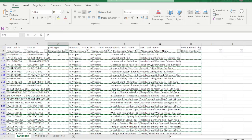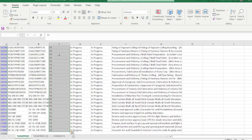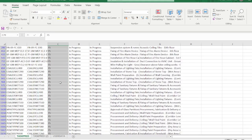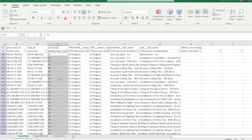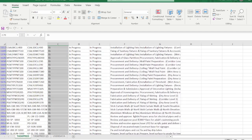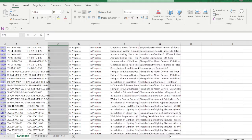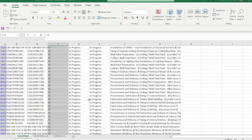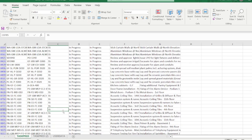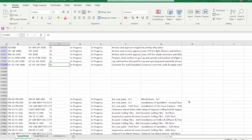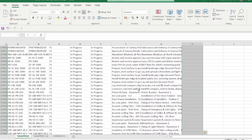Filter for links with Finish-to-Start. These are the links we need to modify. Select the first data cell, press Shift+Ctrl+Right Arrow to select all the data, press Ctrl+C, leave a few rows for reference, then press Ctrl+V. This is Finish-to-Start — now press Escape, then Shift+Ctrl+Down Arrow, then Alt+Colon to select visible rows only, and type 'SS' then press Ctrl+Enter. All relationships are now changed to Start-to-Start.